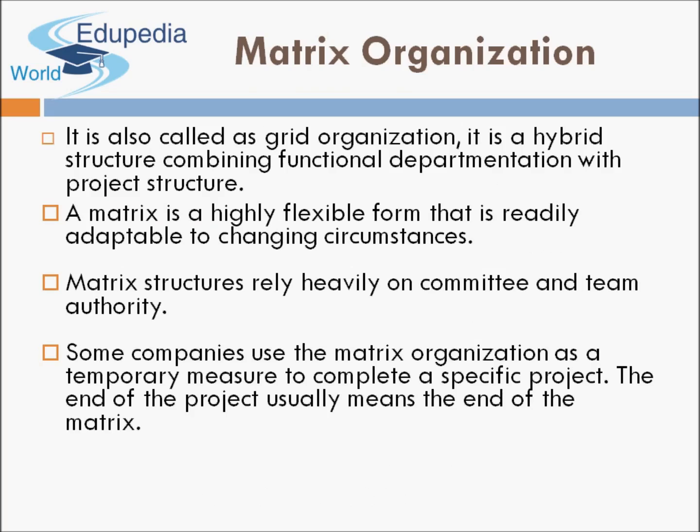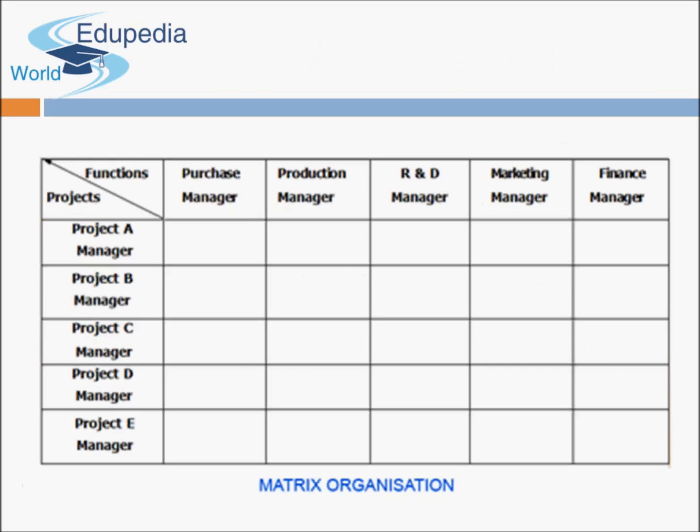Matrix is a wonderful way of departmentalizing. It is a mixture of functional and project departmentalization — the company has functional departments but also has project departmentalization simultaneously. When a company takes on projects, it picks people from different functions like purchase, production, R&D, marketing, and finance to form a project team. Project A might take one person from each of these departments; similarly, Project B and Project C also draw individuals from each department.